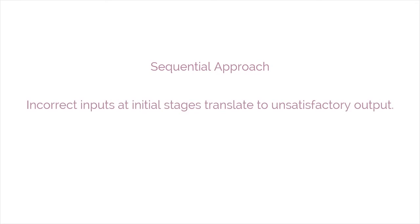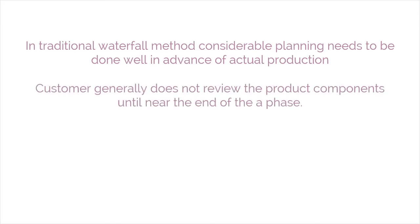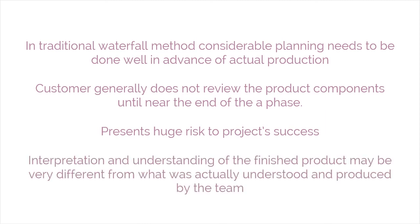Since it's a sequential approach, incorrect inputs at initial stages translate to unsatisfactory outputs towards final delivery. With other methods such as the traditional waterfall model, considerable planning needs to be done in advance of actual production, and the customer generally doesn't review product components until near the end of a phase or the entire project. This method often presents huge risks to project success, because the effect of each risk may be amplified through its impact on several developmental processes, and may have more potential for significantly impacting project delivery and customer acceptance. The customer's interpretation of the finished product may be very different from what was actually produced by the team, and this may not be known until very late in the project's development.